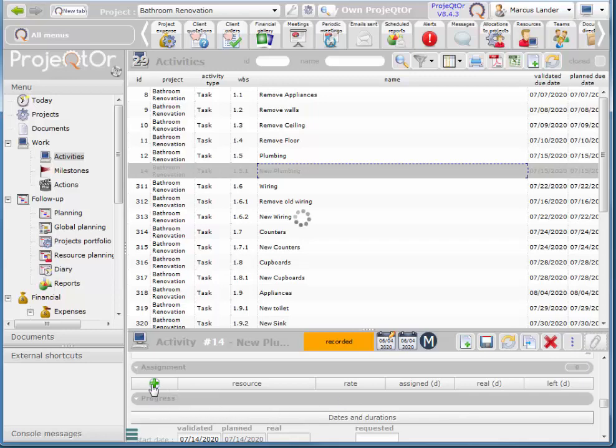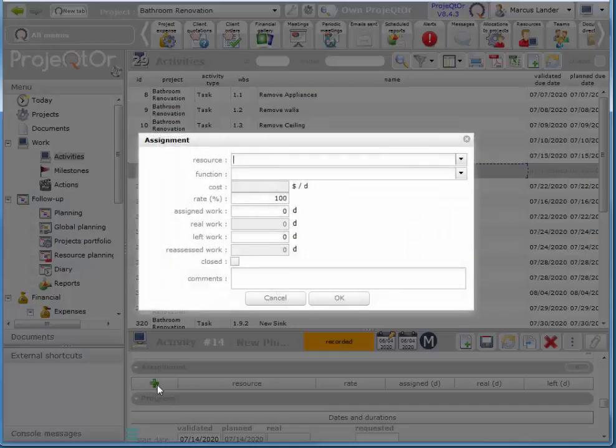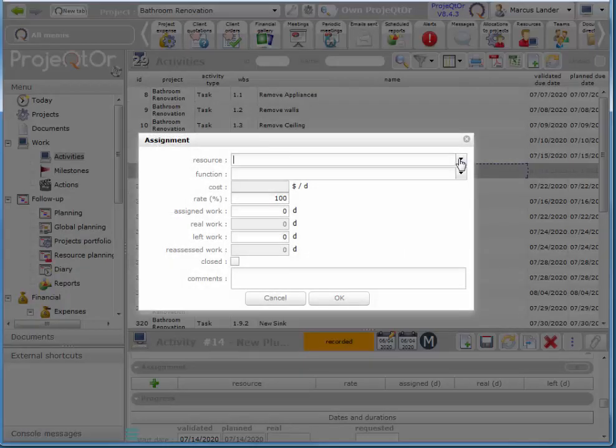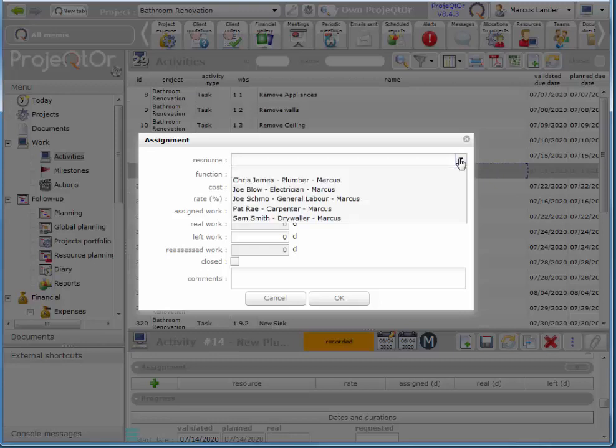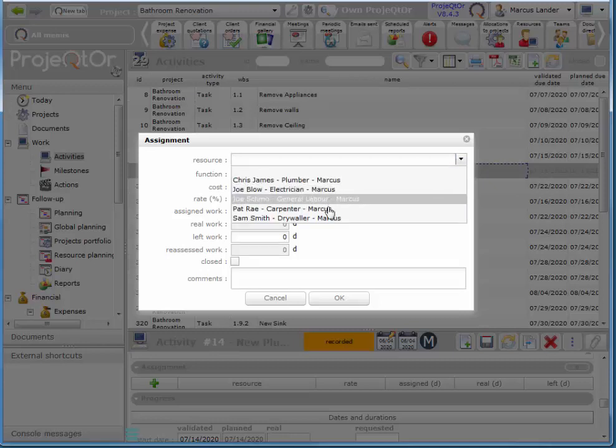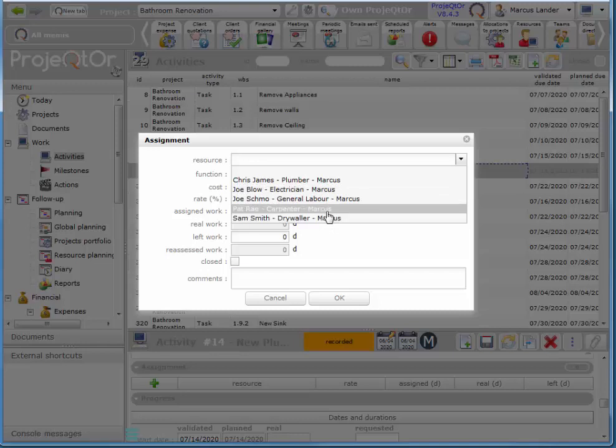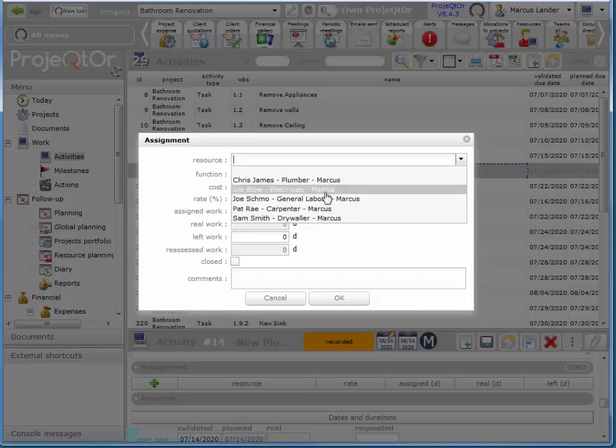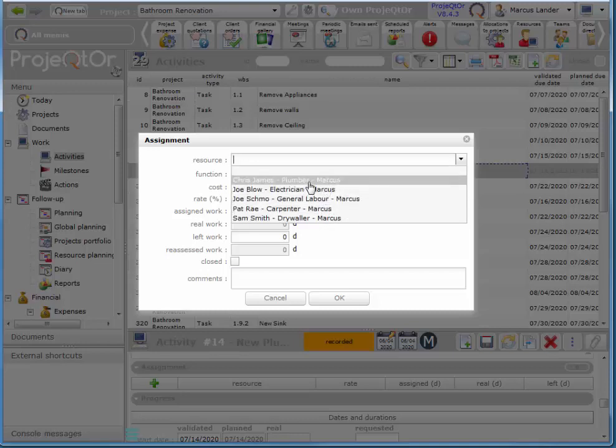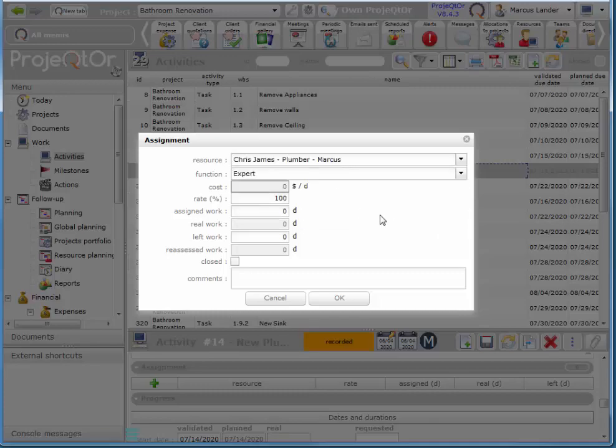Click on plus. Choose my resource. So this list will only be the resources that you have assigned, sorry, allocated to a project. And I choose OK.